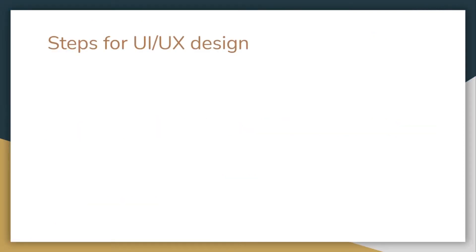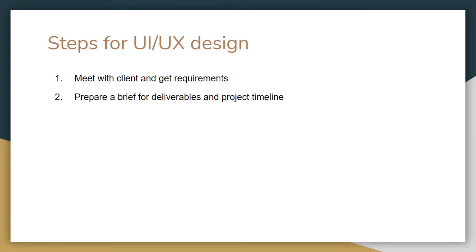Let's see some steps that will be used in our UI design. First, we will meet with the client and get the requirements, which are essential to the design process. Then we will prepare a brief using those requirements, which will contain all the deliverables and the project timeline. Next, we will prepare a persona — a fictional character that is the ideal user for the client's website.